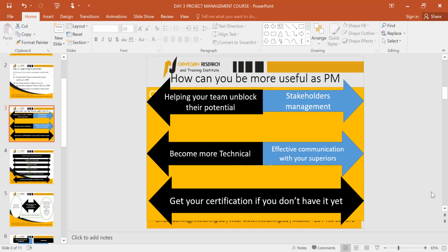No, you must be able to understand your stakeholders in regard to which means of communication is more efficient when I engage Mr. X. Use that particular means of communication. It may be a form, it may be an email. Once you have done the test, on a preliminary basis you just do a trial. But as you get the feedback from the trials, you take note that this one is better when I communicate in this manner. Treat them on an individual basis. So there is what we call individual differences of my stakeholders that I need to understand, so that I use that as the basis of communicating to them.